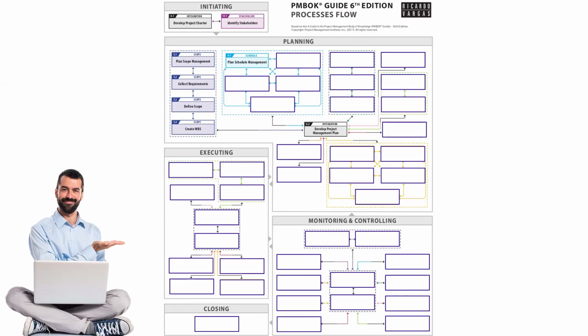Do you have another word for product scope? Product scope, I could say, is the scope about the ultimate deliverable, what the deliverable should look like, what its specifications should be, what its functionalities could be. This is all about the product scope. Would you give me an example, please? For example, you want to build a table: how high the table should be, how long and wide the table should be, what is the color of the table, what is the wood of the table, what is the material of the table, what is the paint on the table. All these specifications about the product are the product scope.